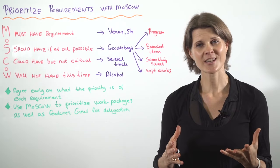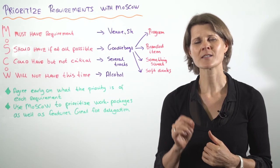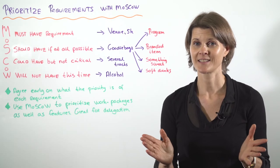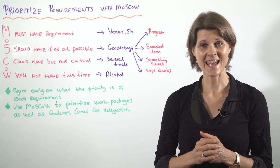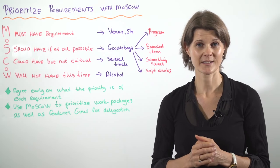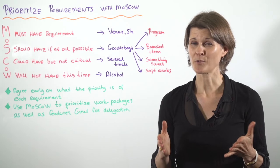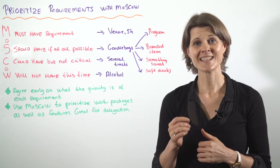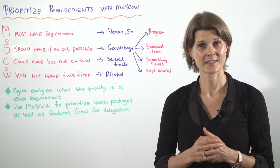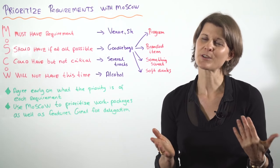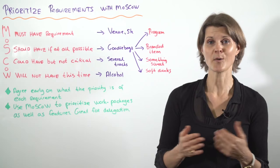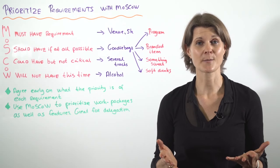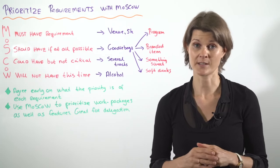In the MoSCoW Technique, the M stands for a must-have requirement — it is non-negotiable, we must have it. The S stands for a should-have requirement; if at all possible we should have it. The C stands for a could-have requirement — it's not essential but we could have it if we have extra time or extra budget. And the W stands for something that we will not have this time around.